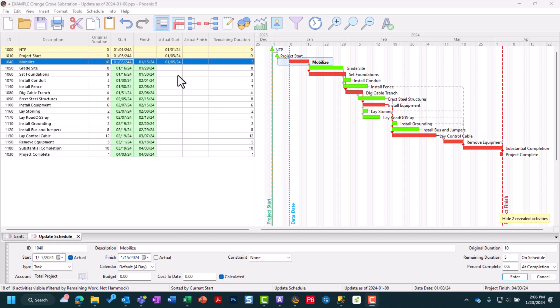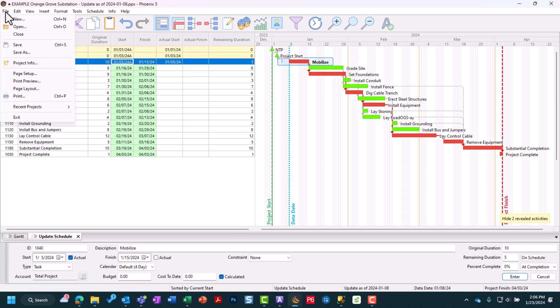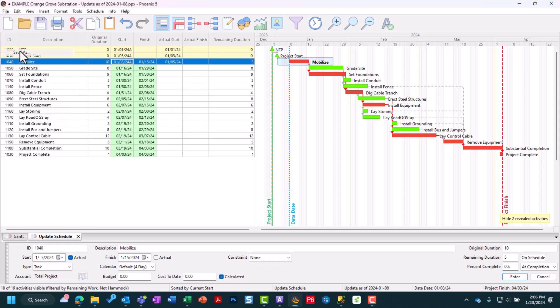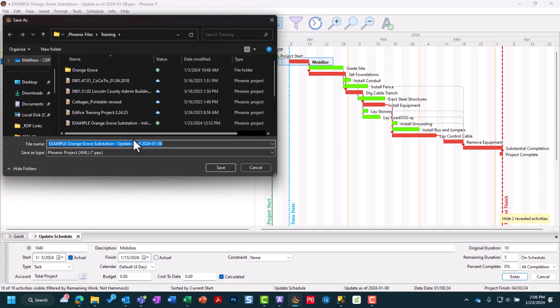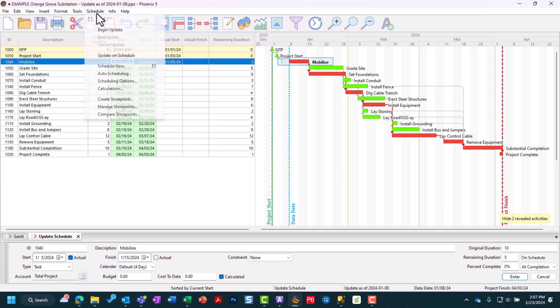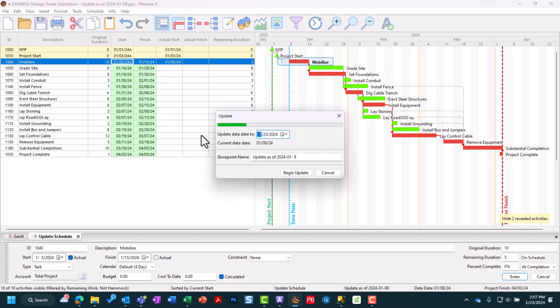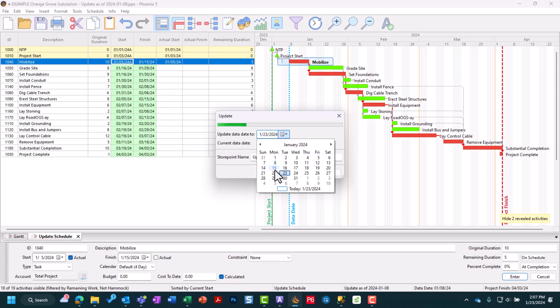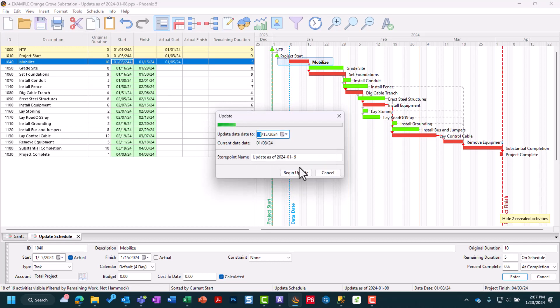Now with our first update period done, if you wanted to create further updates in the future, again the process is File, Save As, and then you redate it. For next week we would do January 15th. From there I would go into Schedule, Begin Update, where we would then need to advance it to that day, January 15th.